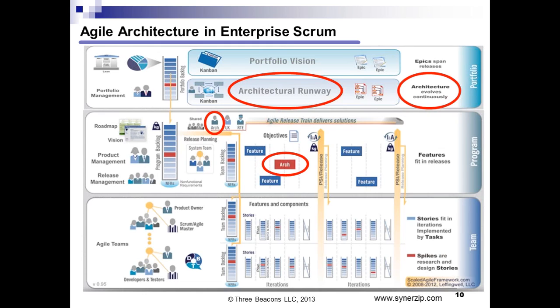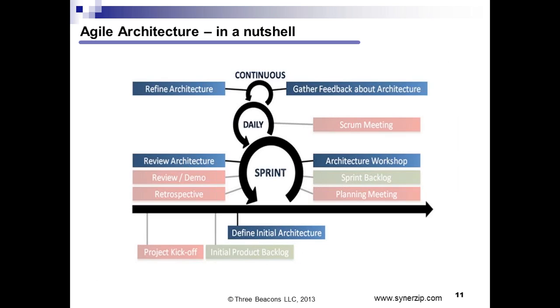And allocating the time to get that in there, so that as the product is being built, you can accomplish some of these architecture objectives as you go. Nobody's ever going to stop production of a product, take 4 months off, and do some architectural updates or changes. That rarely happens. You have to do it as you go. So this is Leffingwell's attempt, which I think is actually quite good, of how to account for those architectural efforts that are not necessarily business value related.